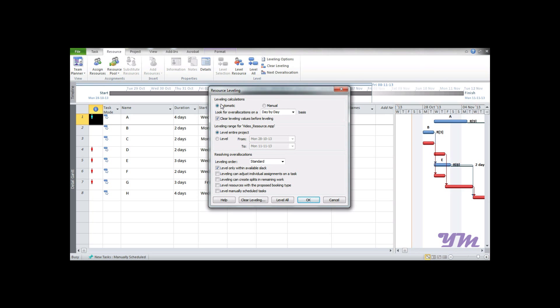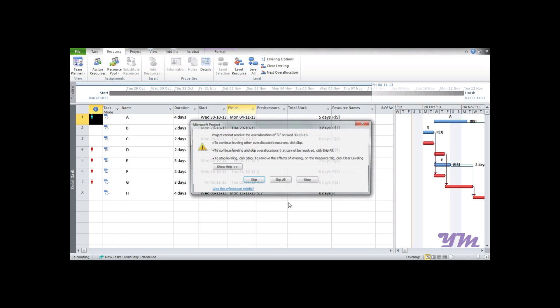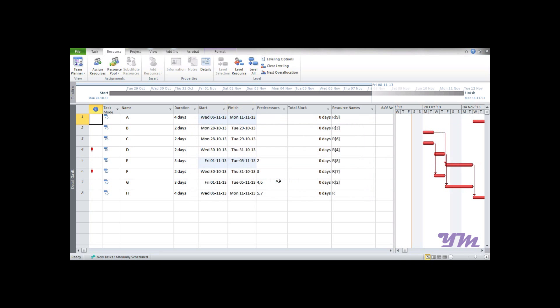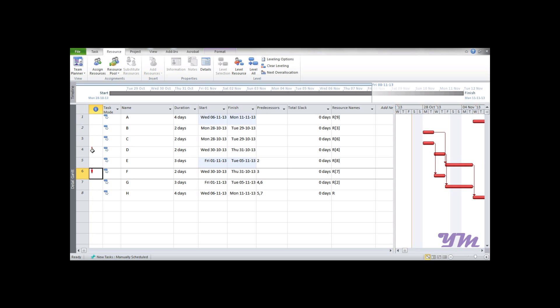To do that, go to the Resource tab, then Leveling Options. Always select automatic mode. Level within available slack, and tick the first box 'Level only within available slack'. Click Level All. Just observe what happens. It will ask about allocation issues - just press Keep All. Now you can see the problem has been solved here, while problems still persist in these two places.